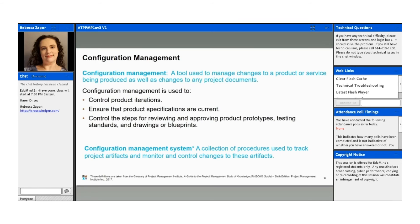Configuration management can have a subsystem called the change control system. When combined with integrated change control, configuration management provides a standardized and effective way to manage any approved changes and baselines within the project. Configuration control involves specifying deliverables and processes, while change control involves identifying, recording, and supervising changes to project baselines.